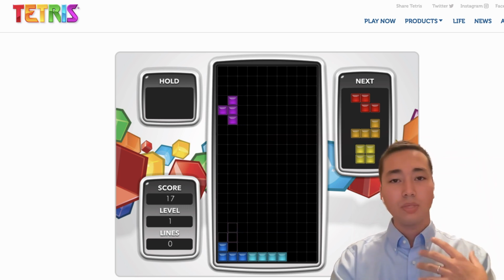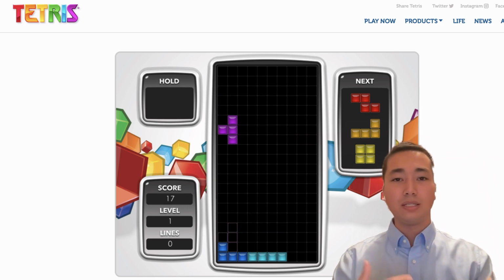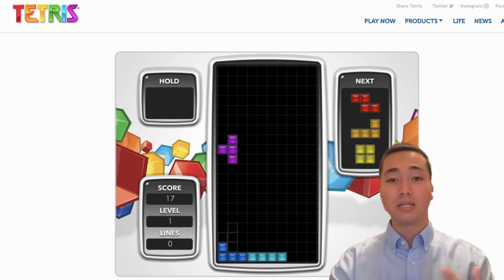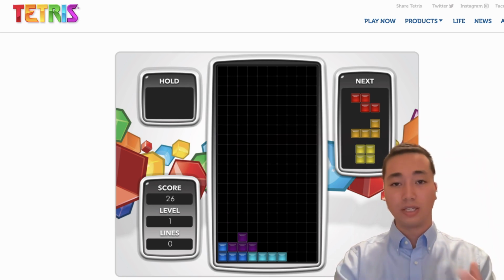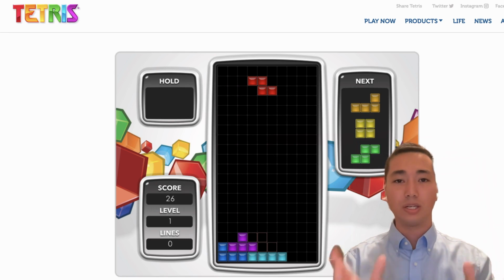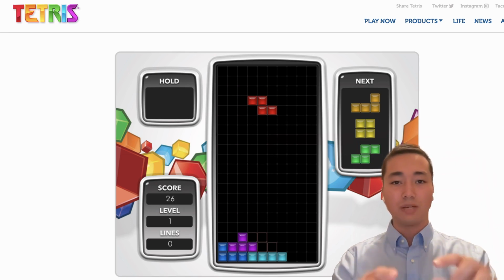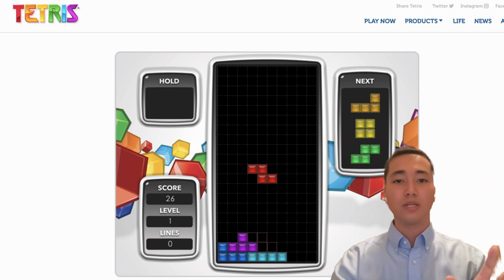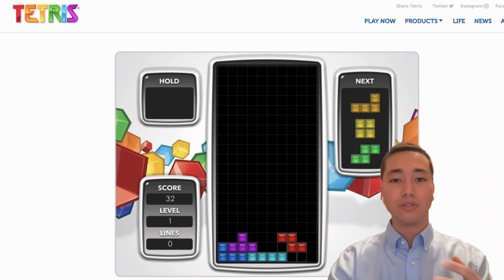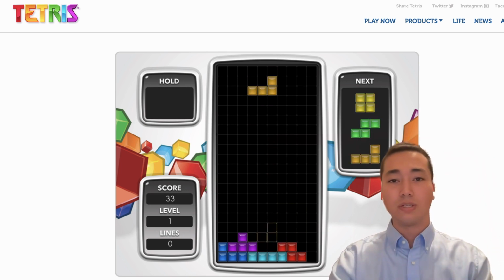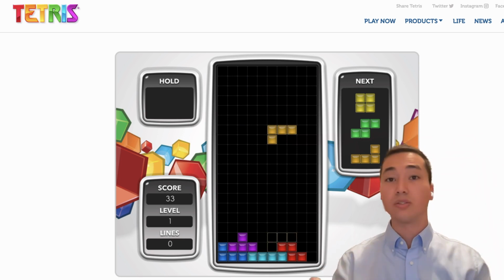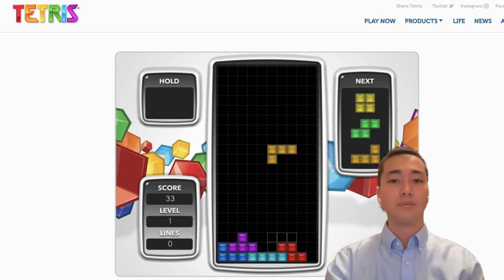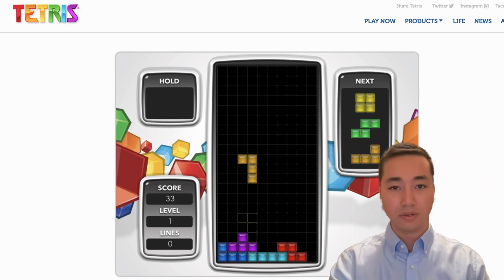Now, in terms of story points, this is what you work together with your team to understand what is the capacity of your engineering team and how many story points that you can complete at a time. So for example, here you've got 10 squares horizontally. And so you could say that this is equivalent to 10 story points. And so in one sprint, I can complete 20 story points as an example.